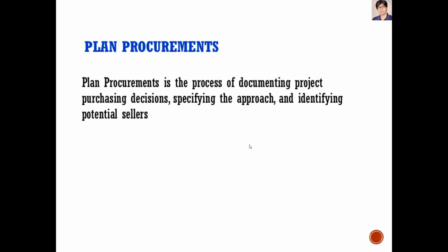So for example, at Peru, over a certain dollar volume, over I believe it's $5,000, we have to push out what's called an RFD, request for documents, and we have to get multiple vendors to all bid on the same item. And we have to then pick essentially based on that, did they meet the quality and the requirements we wanted, and did we pick the lowest cost? So we have to justify that.